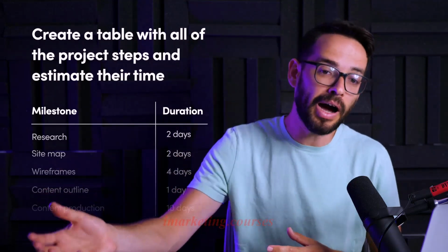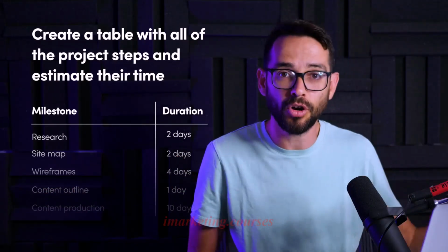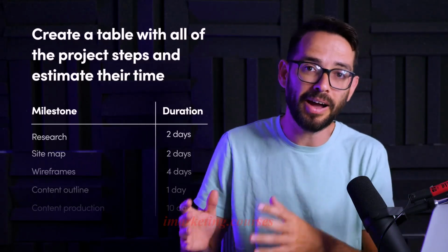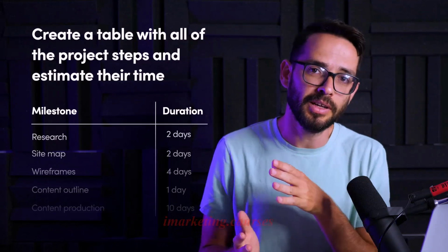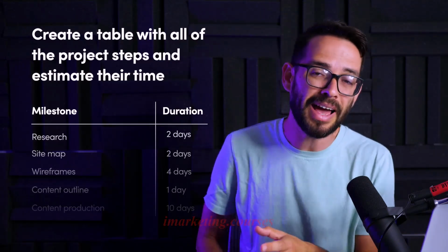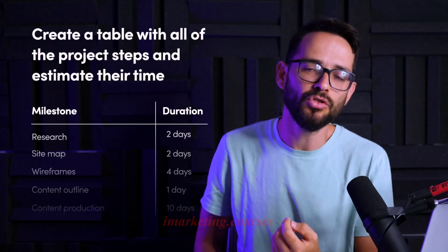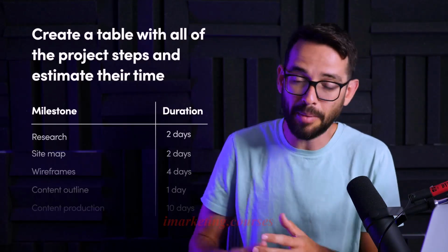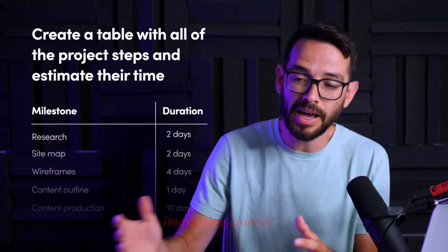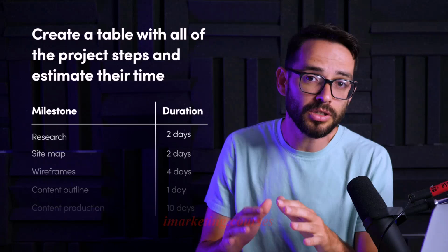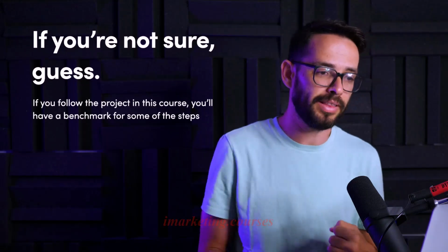If I have to hire a copywriter to work with me, or if I have to hire a photographer to do a photo shoot, that might cost X amount of money. So I'm putting all of this into the calculation. And when I'm estimating for my time, I basically need to know what my time is worth to me, right? How much do I want to make this month? If this is going to take me 3 months, how much do I need to make just to cover my cost, right? How much is my time worth right now?